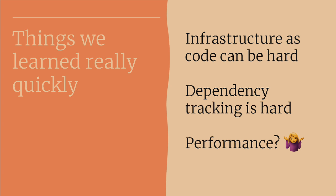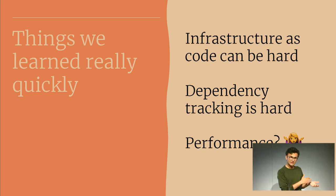Another thing was dependency management. We had technical project managers who had to figure out all of the dependencies that we had never really paid attention to between product teams and infrastructure teams and the various features on the site, to make sure that we had good coverage for testing and that we had support from other parts of engineering to make this a success.